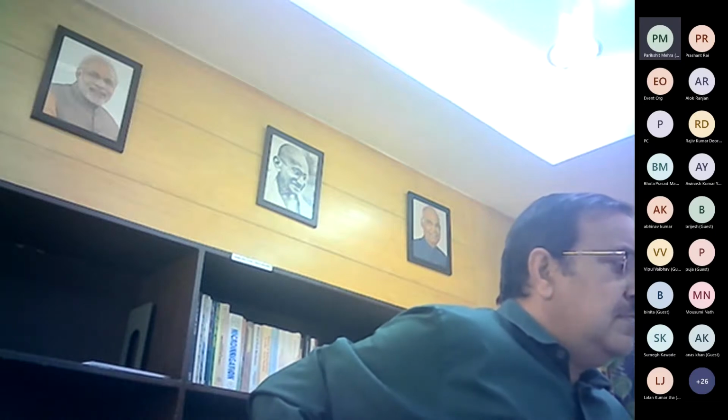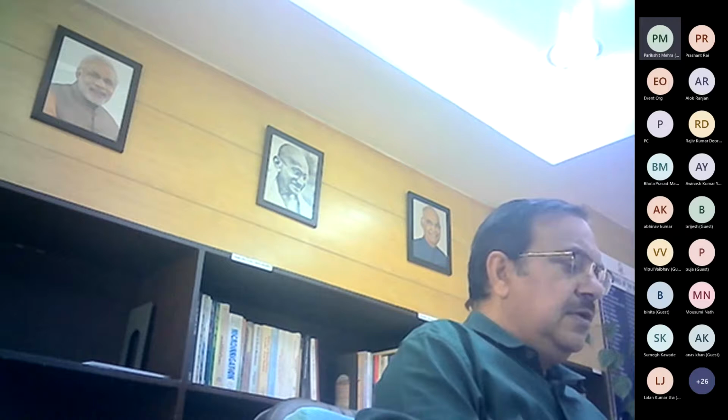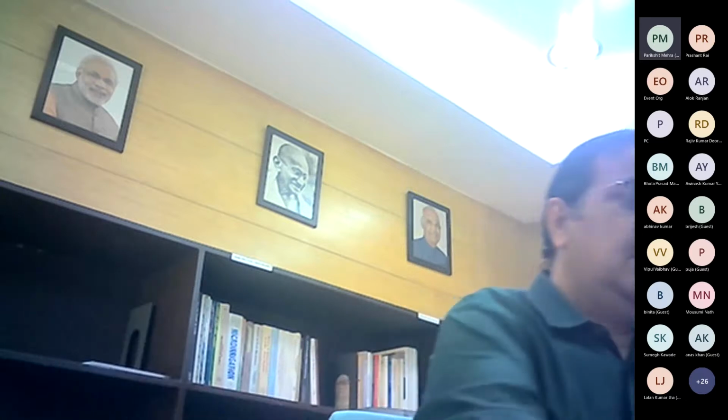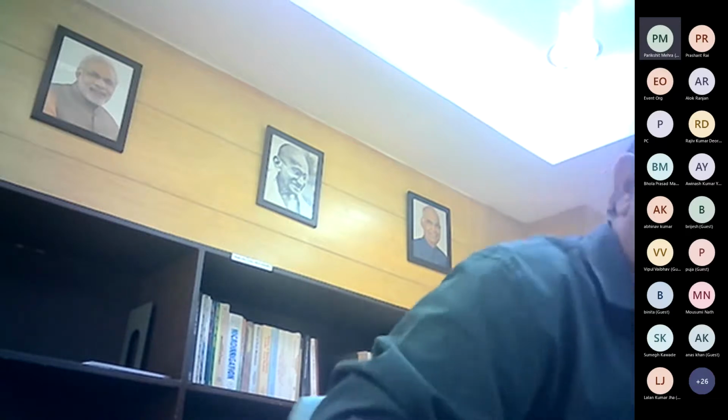In a good tunnel, even in good rock, we should have at least 2 deformation readings in a day. So that we know, okay, this deformation is increasing at this side, probably poor rock is coming, and the geologist is also seeing it on the face, and he says, yes, I think poor rock is coming from the right, and now that we are progressing into this area, we are going to get poor rock on our face, and we must now, from that point onwards, start increasing your rock bolts.